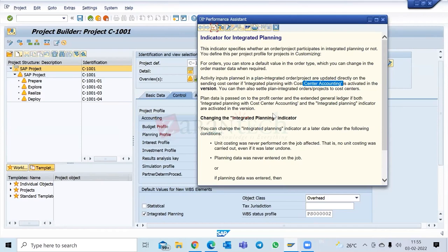Correct, in KP26. What does that have to do with project systems? Yeah, in project systems also we have work centers, like we have in PP. Similarly, work centers we can use in PS also in the activities for the work performed. It could be machinery, or it can even be used for manpower, like the resources, skilled resources, unskilled resources, different types, like engineers, technicians, or different trades.